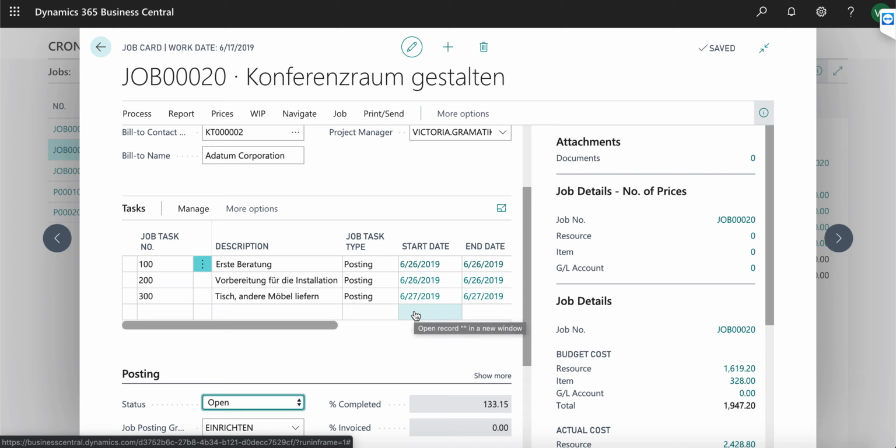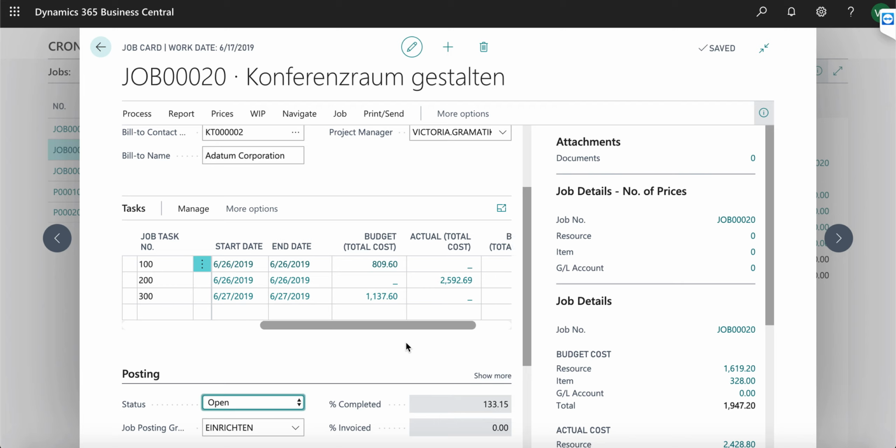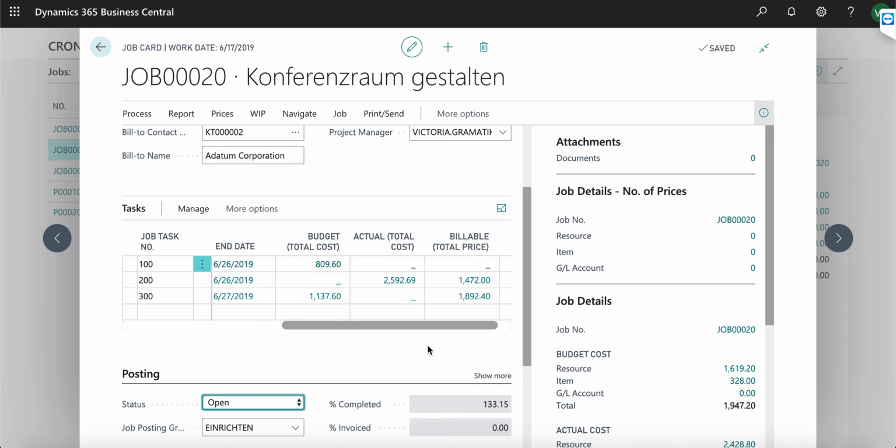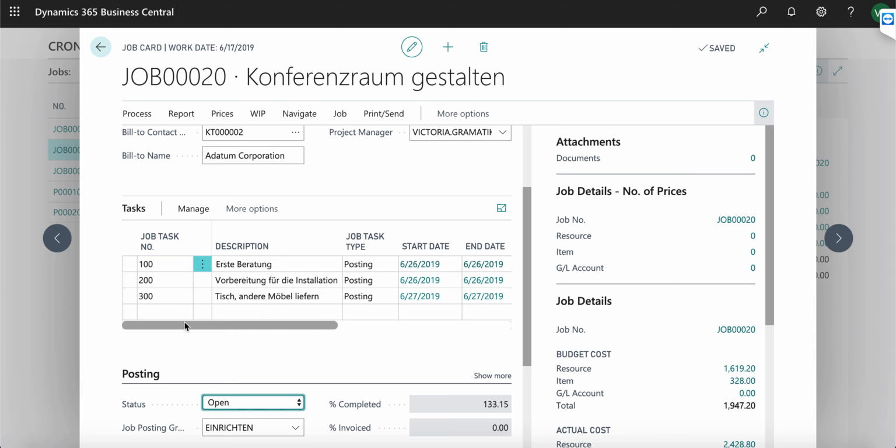You can use the Jobs module for estimating and also for actual work, and it's all seamless by line level estimating. The project tasks and work packages can be presented by what we call the job task lines. The job task lines are an unlimited list of rows that you can structure however you see fit. For example, if you've got a very detailed breakdown of a 2-year job, you could have hundreds of lines. But if you've got a 1-month job, you might set it up with just 1 or 2 lines and you may not even do any indenting.